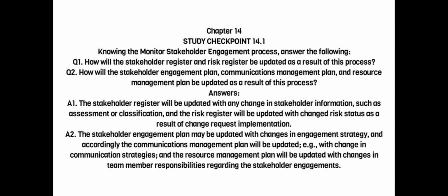A2. The stakeholder engagement plan may be updated with changes in engagement strategy, and accordingly the communications management plan will be updated, e.g., with change in communication strategies, and the resource management plan will be updated with changes in team member responsibilities regarding the stakeholder engagements.